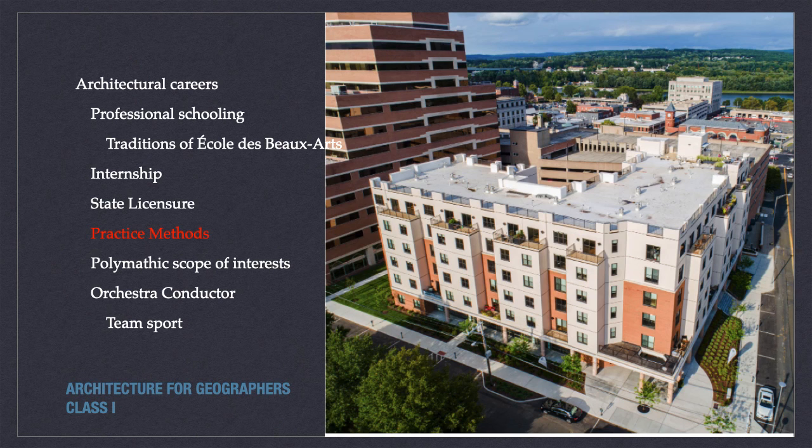And one odd thing, unique in business, is that the architect is the first arbiter of what the contract is between the contractor and the owner, because the architect prepared the contract by drawing the drawings and writing the specifications.